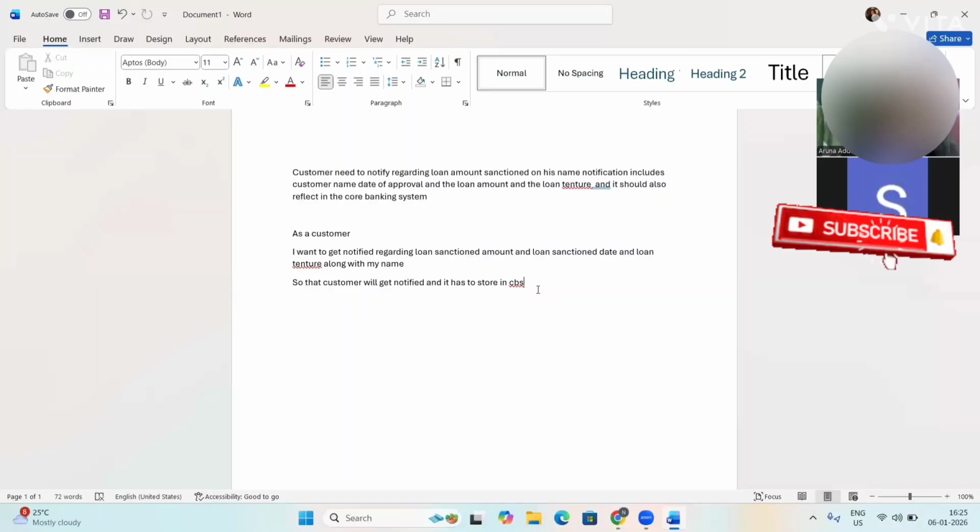In that kind of scenario, first I will speak with my project manager and try to understand the requirements, and I will speak with my product manager and validate them against the project requirements and limitations. After that, I will do impact analysis and prioritize the requirements based on whether they are low, medium, high, or critical. And in the end, I will make sure I update it in JIRA as the change request is finalized.